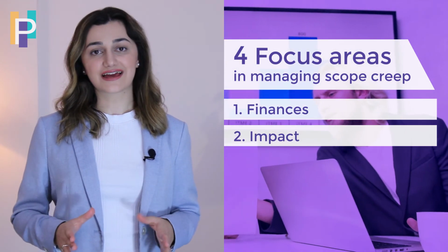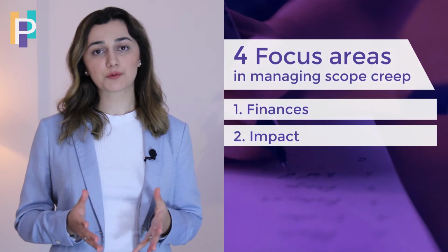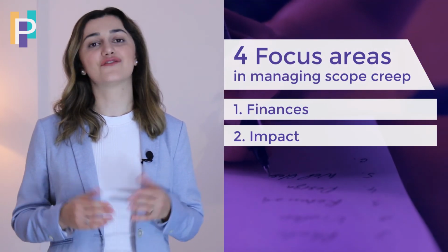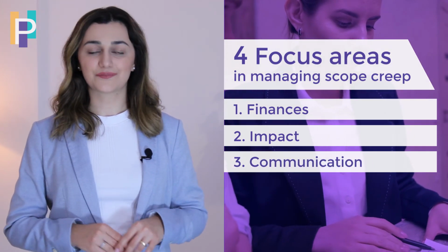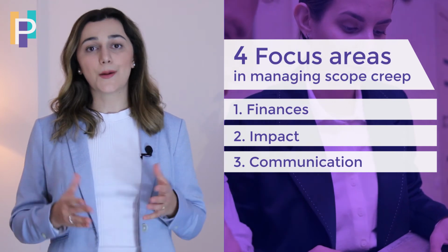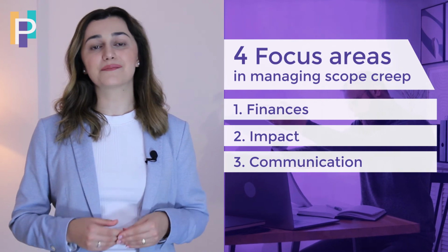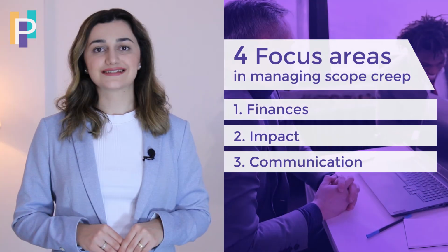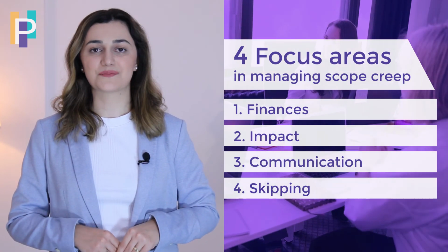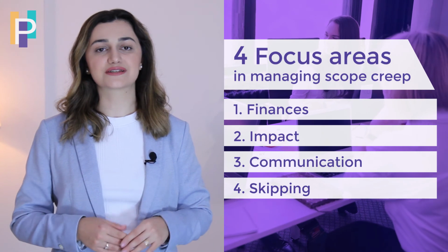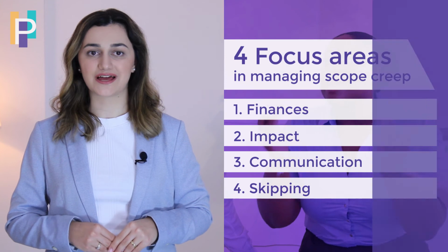Impact. Thoroughly analyze the consequences of the change from each and every aspect of the project. It will be beneficial to create a separate checklist of all the expected results of the scope change. Communication. Talk to the customer and help them analyze the end goal of their request. By doing so, you aim to minimize the change if possible and consequently minimize the risk associated with it. Skipping. Don't ignore the risks and don't multitask without a clear analysis of impact. Such a hasty approach can result in unexpected issues which will accumulate due to the lack of a structured plan.